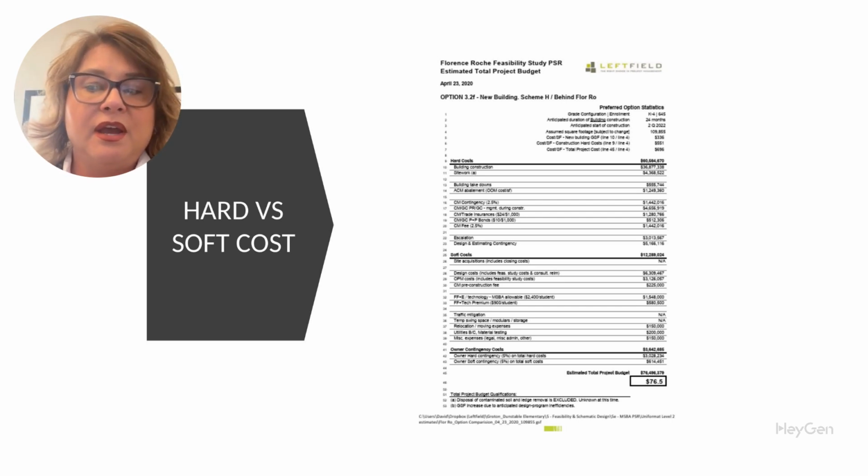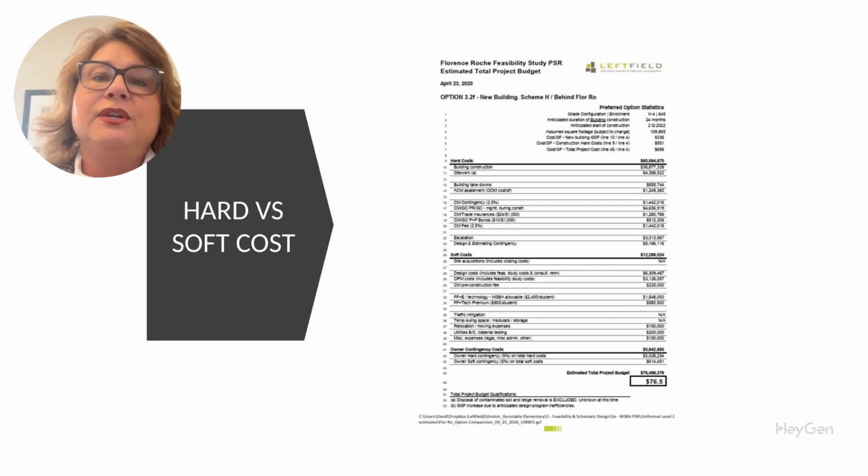Beyond hard and soft costs, there's also a separate owner contingency of nearly $365 million. This includes a 5% contingency on hard costs, or about $3 million, to cover unforeseen construction issues, and a 5% contingency on soft costs, about $616,000, to manage scope creep or design changes on the owner side.